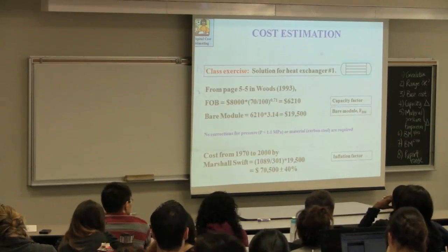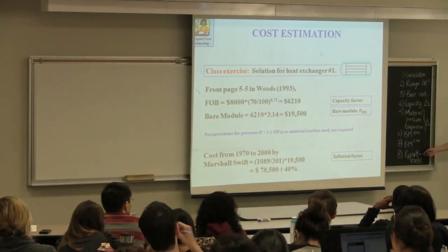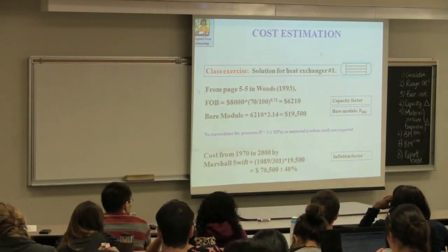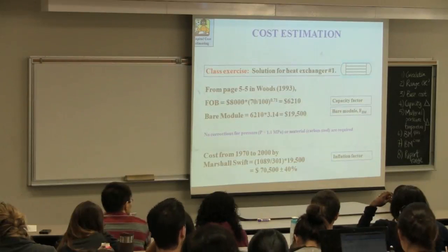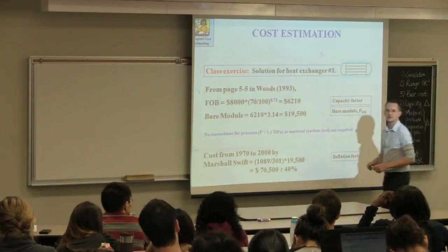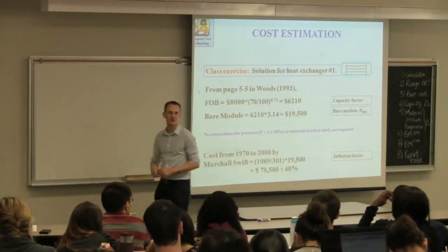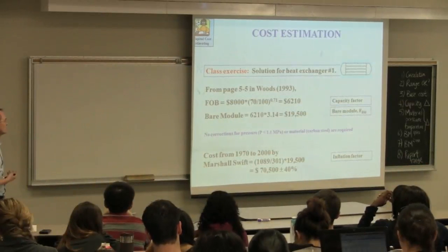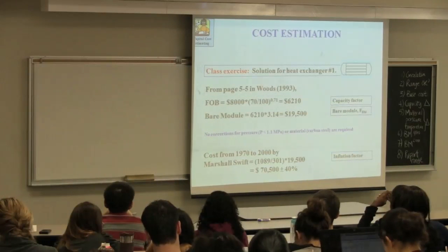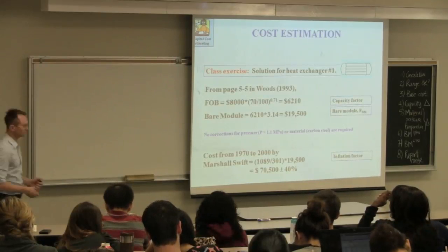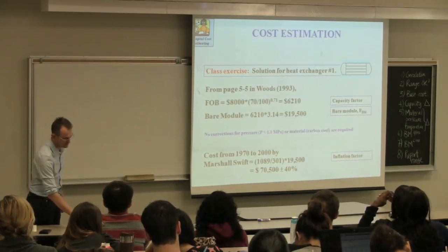So if you're inclined, when you're reporting this, rather report the upper bound than the lower bound. Okay? So the thing is, just for budgeting purposes, you'll see this when you work in companies, they don't mind spending money, but they don't like to be asked for more money. So if you give them an upper bound estimate, that's generally going to be the safer bet. And rather come in under budget, and you will probably look better as well. So the range is very important to report, or to be aware of.